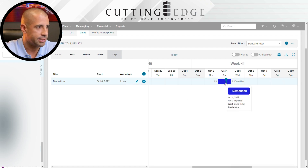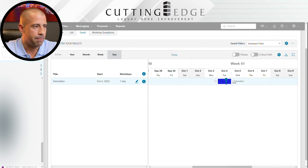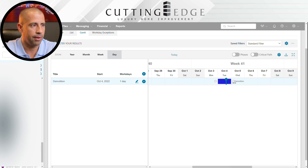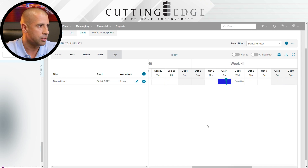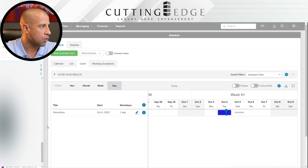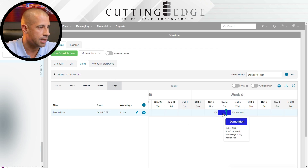I've already started with one activity, which is demolition. Each activity is basically a crew of people that are going to be working on this project. For demolition, you're going to need a crew of people to go demolish. You're going to need a crew of electricians, a crew of painters, and so forth. So the first thing I like to do is write down all the activities that apply to this project.